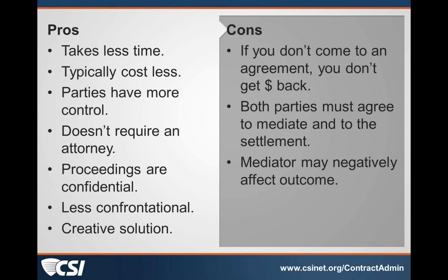They can agree to different ground rules at the beginning, and as I said, they agree to who the mediator is. It's not somebody that's dropped into the picture that they have no say over. You don't need an attorney. I would recommend that if you do come up with an agreement, you draft up a settlement agreement and have both sides' attorneys review that, but you don't have to have an attorney while you're doing the negotiations. The procedures are confidential.